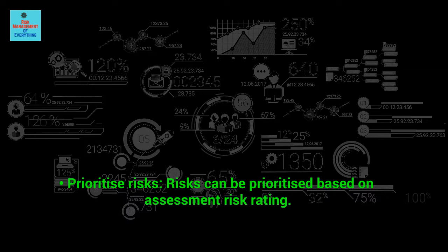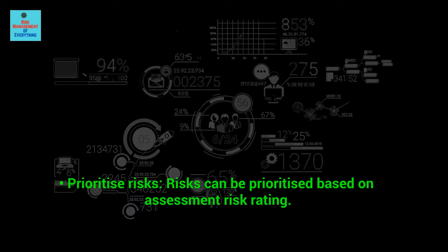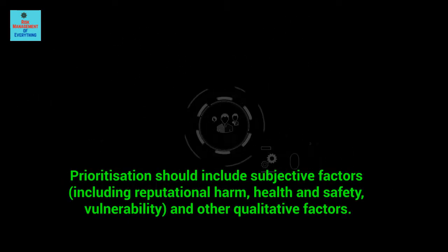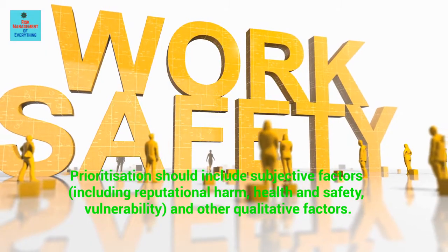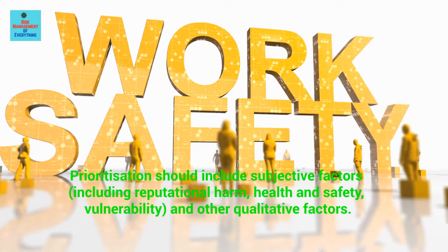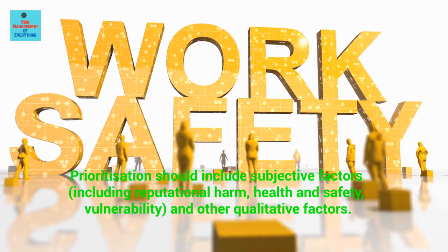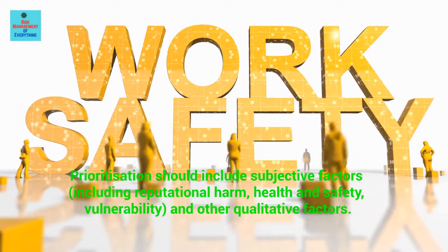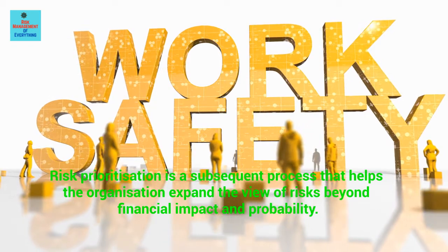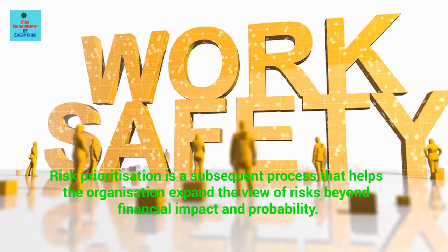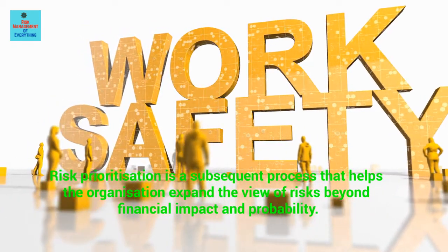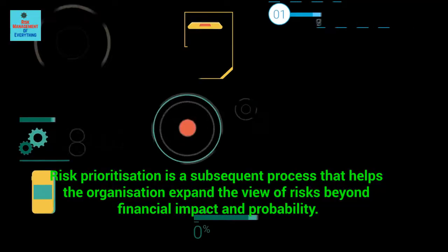Prioritize risks. Risks can be prioritized based on assessment risk rating. Prioritization should include subjective factors, including reputational harm, health and safety, vulnerability, and other qualitative factors. Risk prioritization is a subsequent process that helps the organization expand the view of risks beyond financial impact and probability.